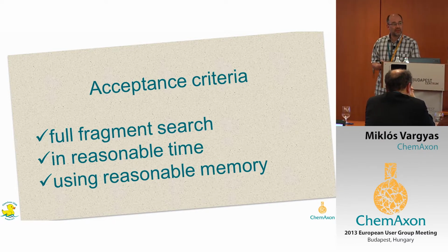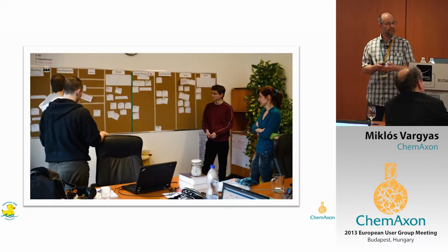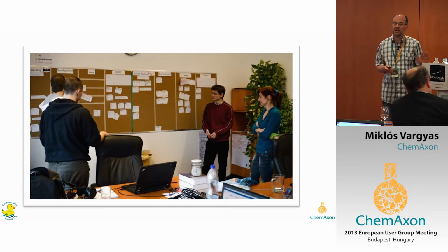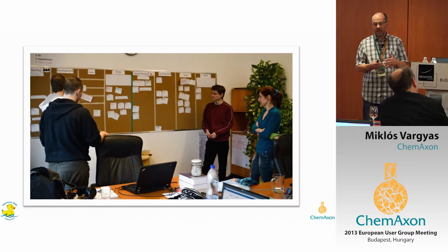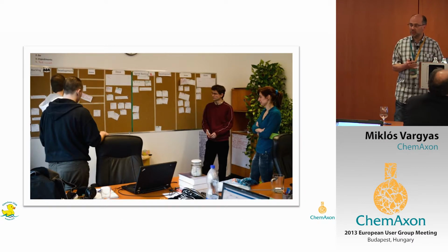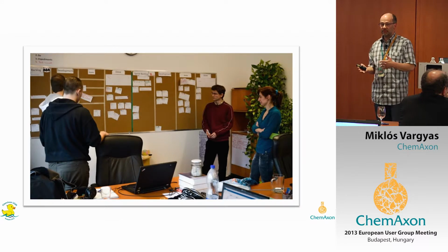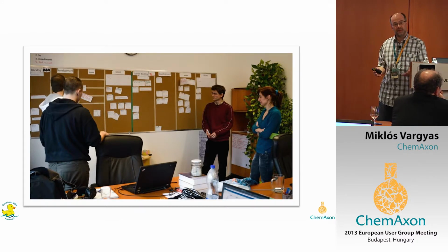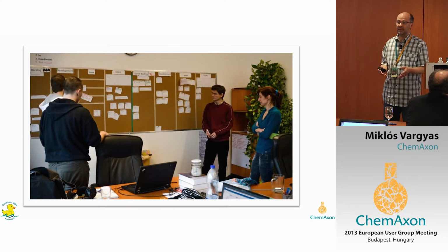Now in the sprint, the team meets every day for the so-called stand-up meeting. That takes 15 minutes. We often call it a daily scrum. And there the team shares experience. What did they do the day before? They give feedback to each other. They see where they are. And based on where they are, they decide what to do in the next 24 hours.